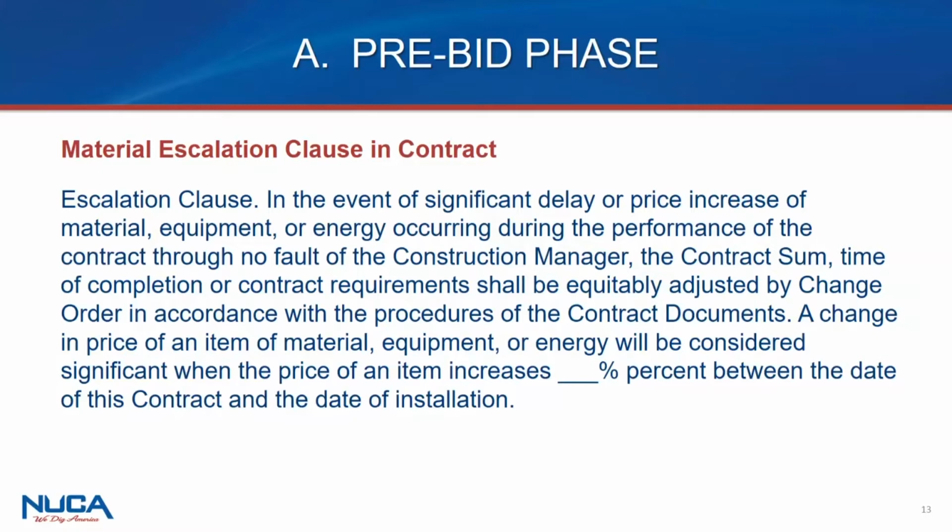And when everyone came back, he was looking for time and he was looking for additional money for material and labor, and it was denied. And it was denied because it was deemed to be a unilateral decision. It wasn't a decision that the government, the owner in this case, participated in. So there's a lessons learned right there. The federal acquisition regulations control all federal jobs. So they had material escalation clauses that would allow for an increase due to pandemics.